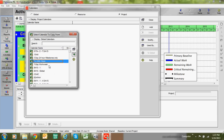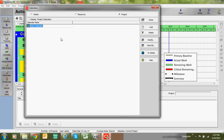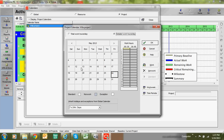Select a calendar — for example, the seven-day 24-hours calendar — and give it a new name for our project. Go to Modify. Seven days 24 hours means seven working days with 24-hour shifts, which represents three shifts. Our calendar, however, should be 10 hours per day with Sunday as a holiday, meaning a six-day, 10-hour working week.